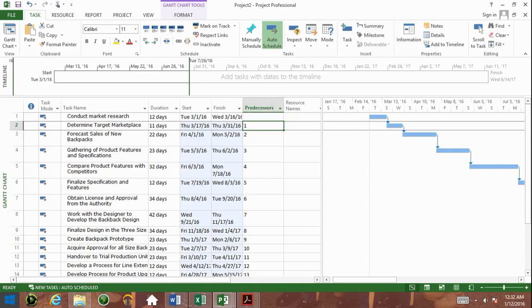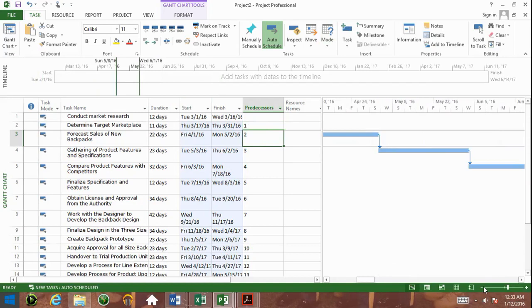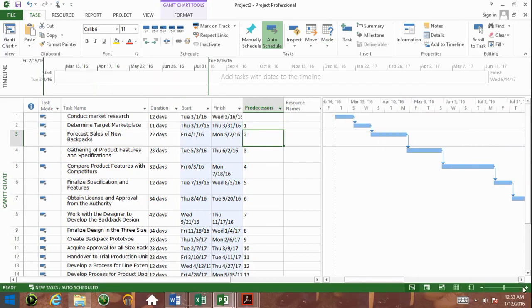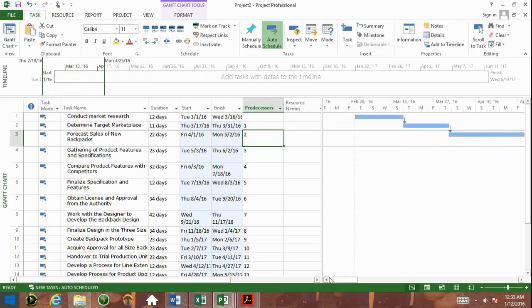You've been through chapter 6 in the PMBOK guide, right? So you know that 1 is a predecessor of 2. But you know that 2 is a successor of 1. So just keep that in mind. There are many different ways you can link tasks. I'm going to show you a few ways here. For task 1 to 2, you can see it's a finish to start relationship. Finish task 1 and start task 2.